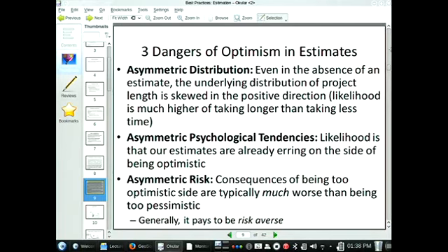Well, it's good. You have more time for testing, maybe. They have more time for rehearsing things. How about if you finish in January? They basically allotted December already for the whole switchover process. Now you've upset their schedule. Now suddenly their January is devoted to other things, maybe some sort of bookkeeping or what have you. And now they have to change their whole schedule around.